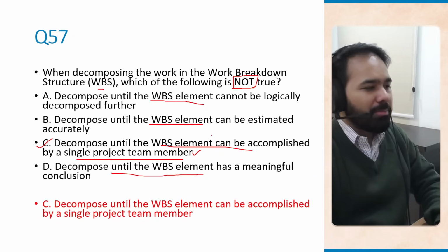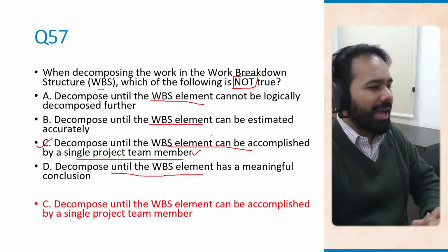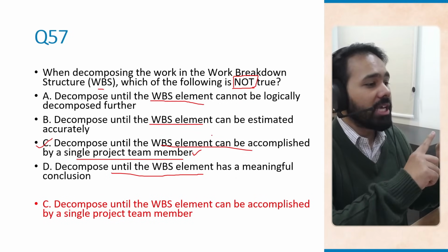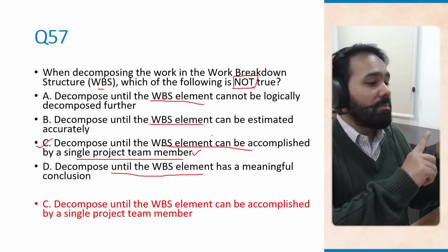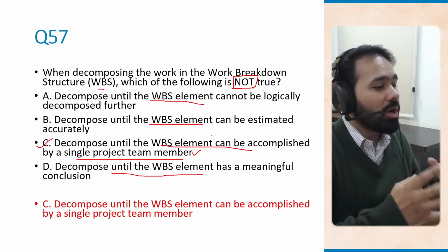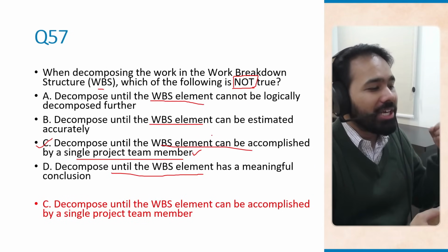So the decomposition of a WBS is done until the work packages are clearly defined, until they are measurable, they are estimable, they are manageable and assignable.